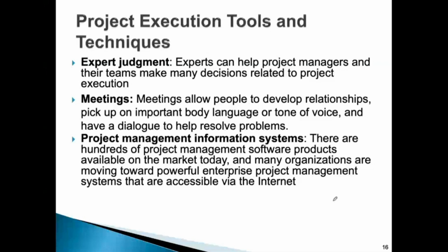So you need to have lots of meetings, and usually in projects you have lots of meetings, like a progress meeting. You check how the process is running. So you meet every week or every day, it depends on the sensitivity of the project. Some projects you have to meet every day. Some projects you need to meet every week and see what was done throughout that period, and then you can take some actions.